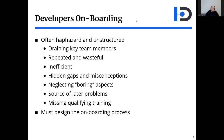Onboarding is typically something you do at the front end with the initial batch of developers, but you may have to onboard developers as you phase them into the project as well. Sadly, onboarding is often haphazard and unstructured. The predominant technique for onboarding is the new guys just go and drain effort from key team members — especially those on the critical path, because those are obviously the best developers. When people onboard in this unstructured way, they tend to do it again and again.